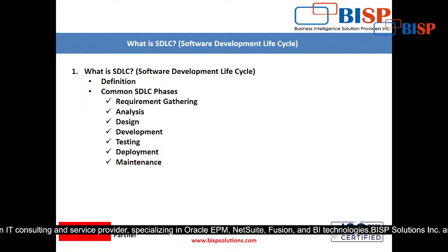For example, if the college department says that as soon as the college fees are submitted, an SMS should immediately be sent out to every mobile. That requires a subscription, a bulk SMS subscription. So we have to analyze exactly what they have given, what we are going to provide them, and how much of that requirement we are going to provide.